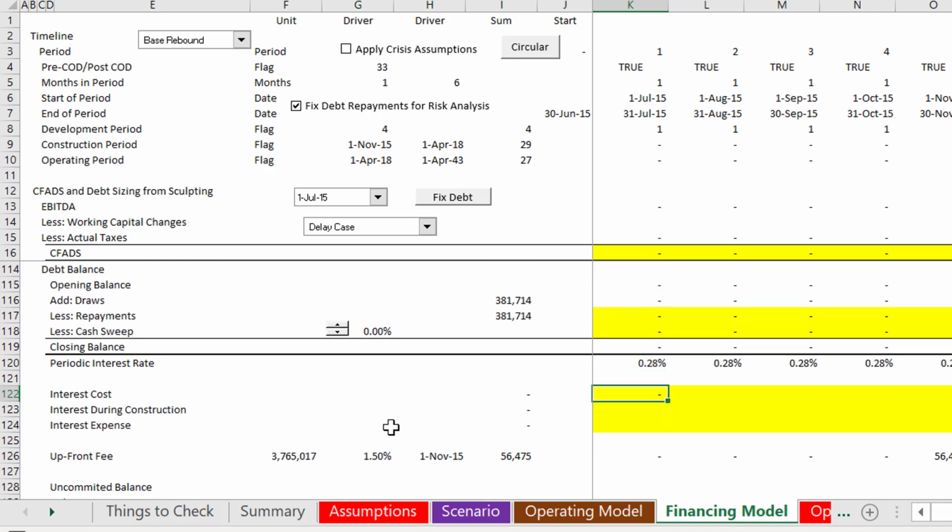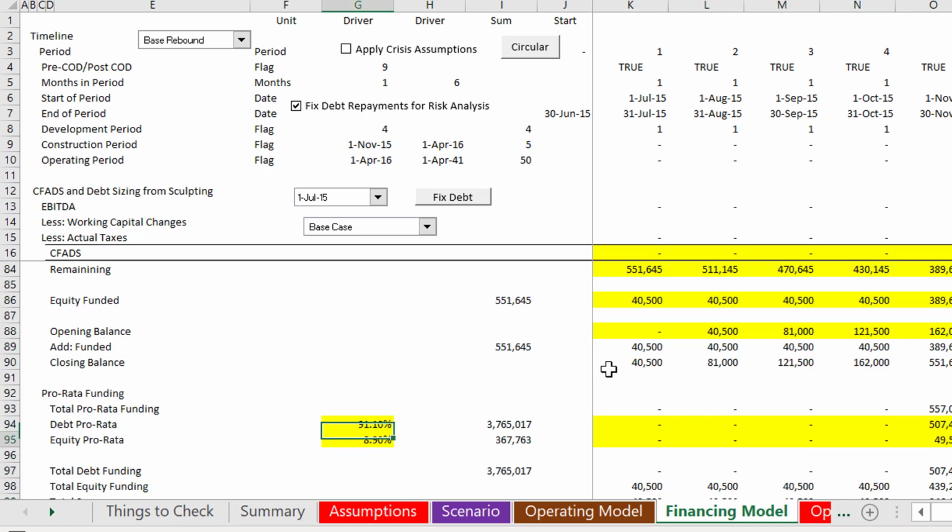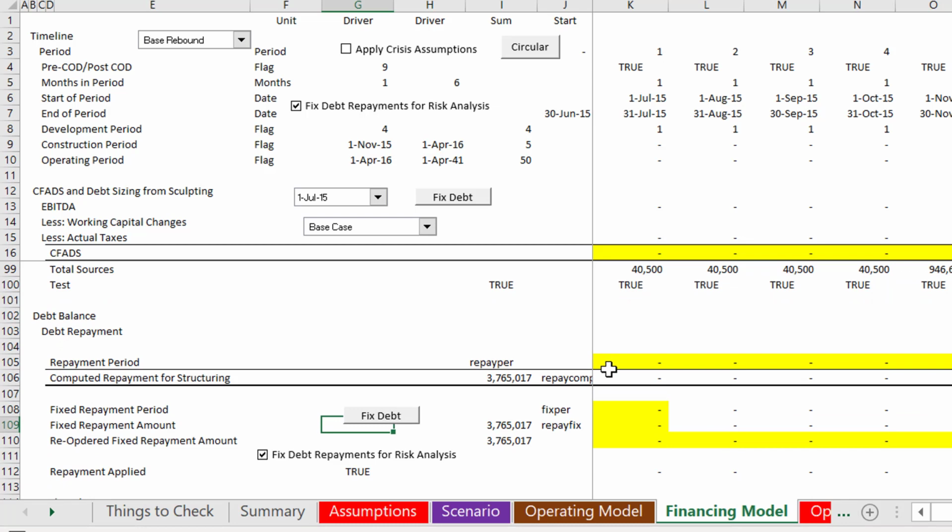Let's put the interest in. And then, of course, let's just allocate this interest. If it's the construction period up here in line 9, we're going to make it interest during construction, and I'm going to take this total period, and if it's the operating period, let's put it as so we put the equity. I mixed up the debt and the equity percentages. Maybe in the future I'll have to remember to put the equity first and the debt last.